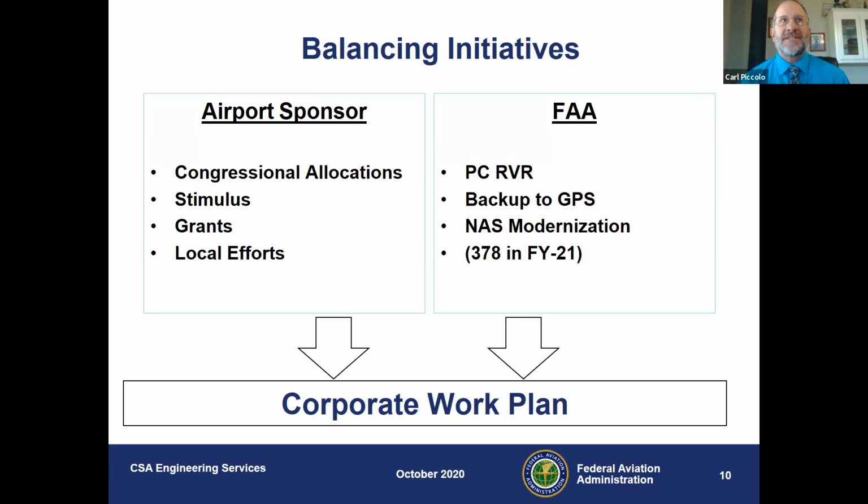There is no distance in the future that's too far. If you think of something that's going to happen in the next 10 years, call us. We will put a placeholder in the corporate work plan, and that will get Connie and Robert's personnel in contact with you and having periodic discussions with you to see how your effort may be going and see how close it actually is to fruition. If you've hired a consultant, if you've got a design and you're wanting to go to construction in the next 90 days, it's usually too late for me to be able to support it. And I'll show you that here in just a second.